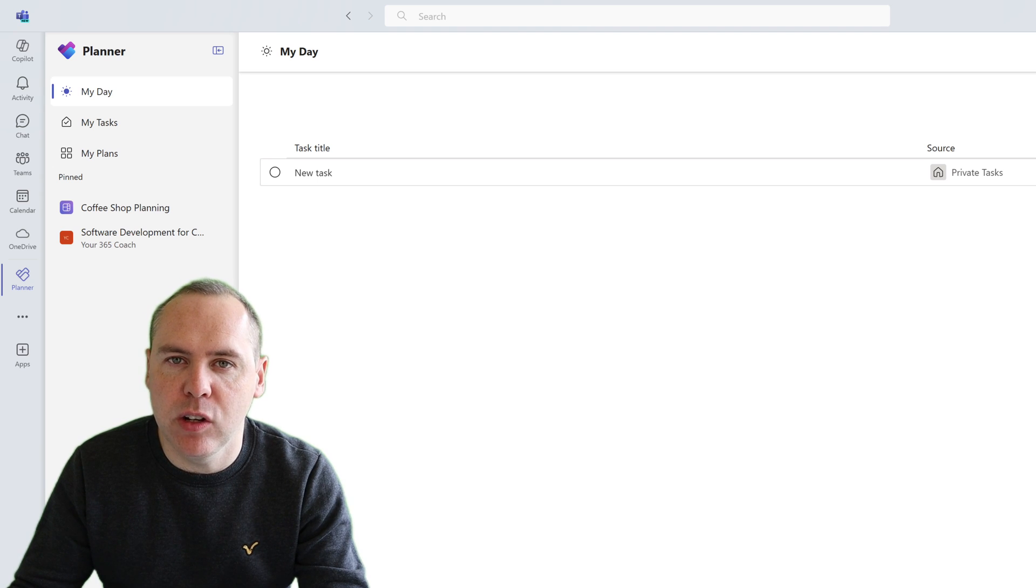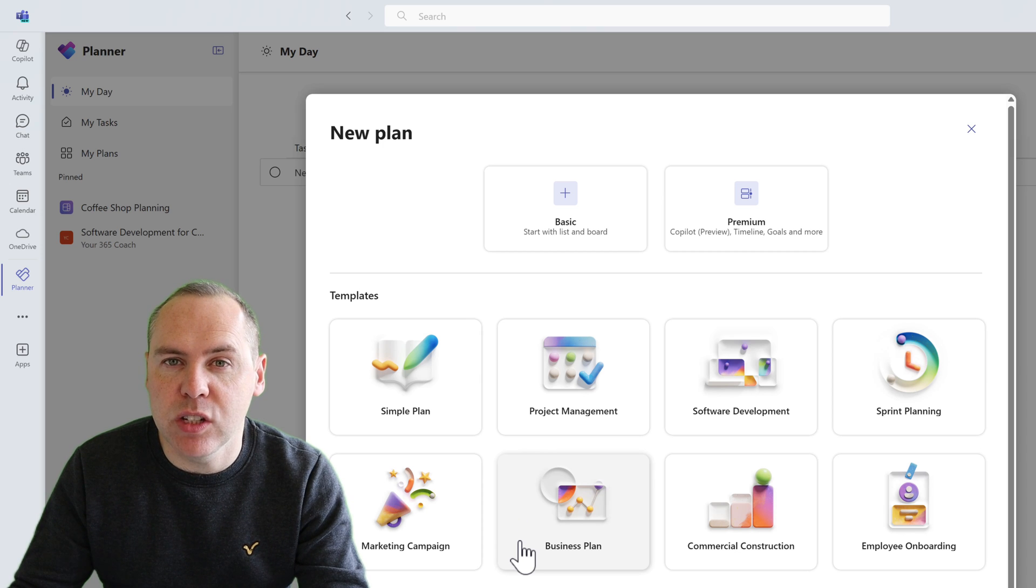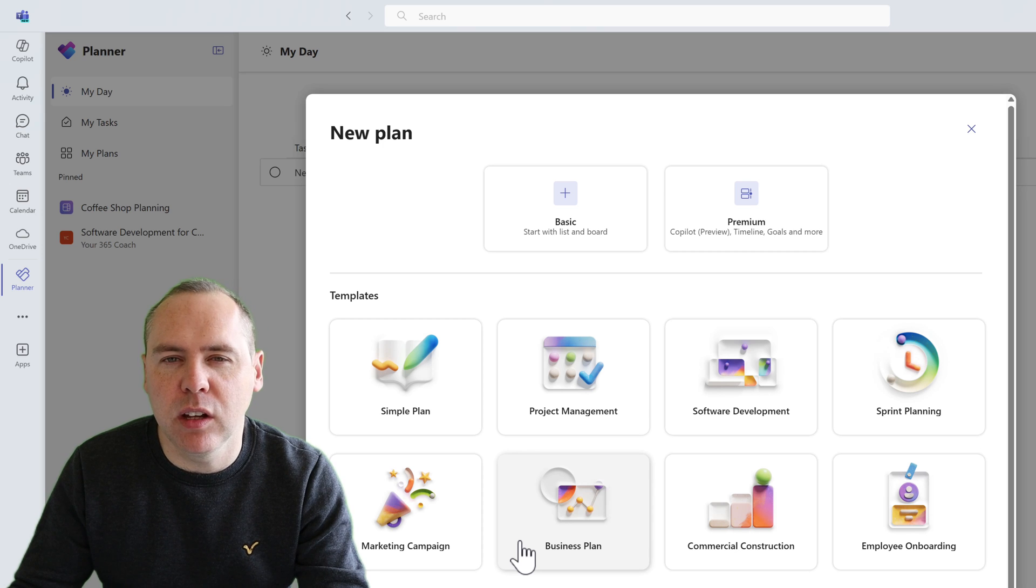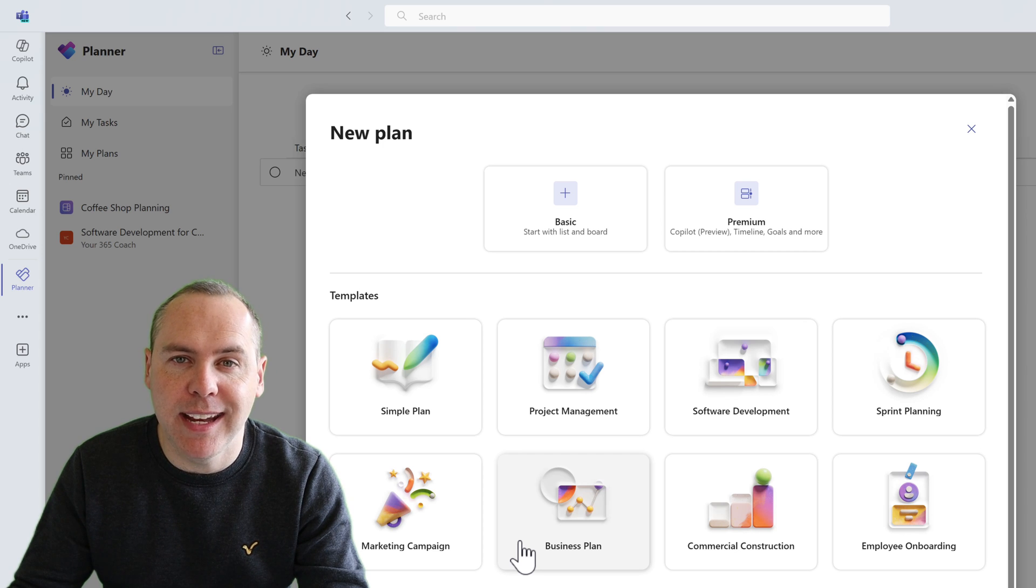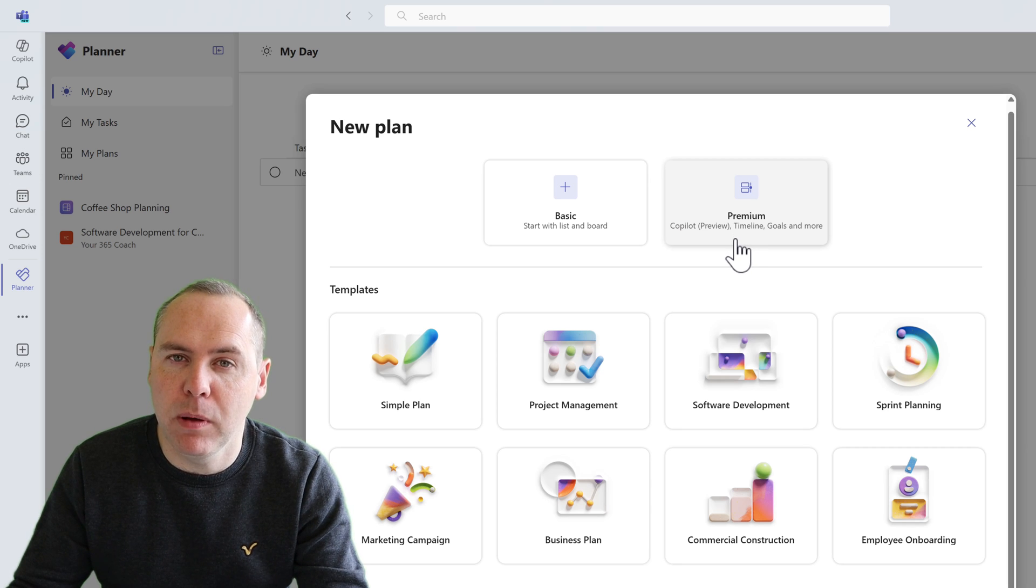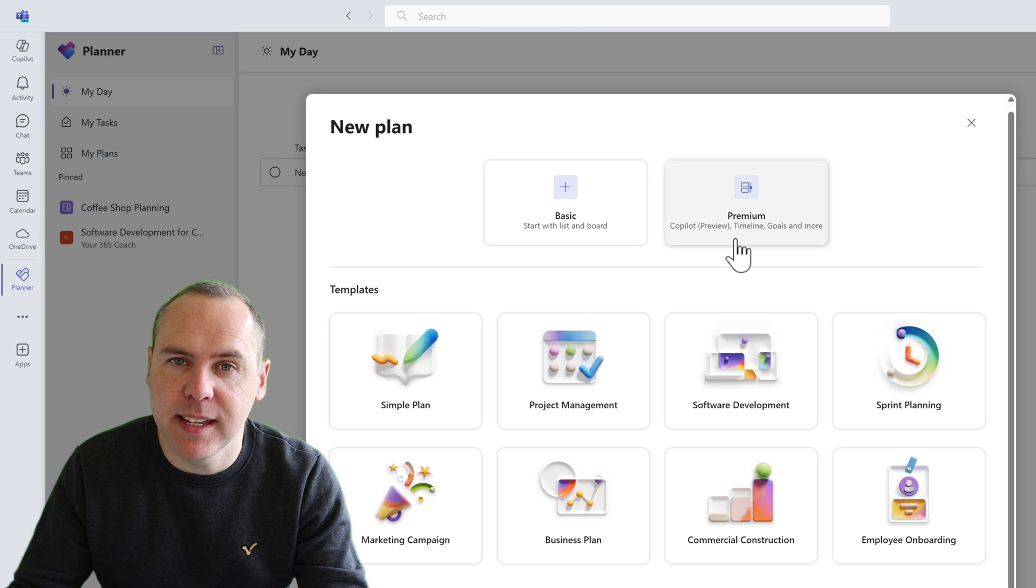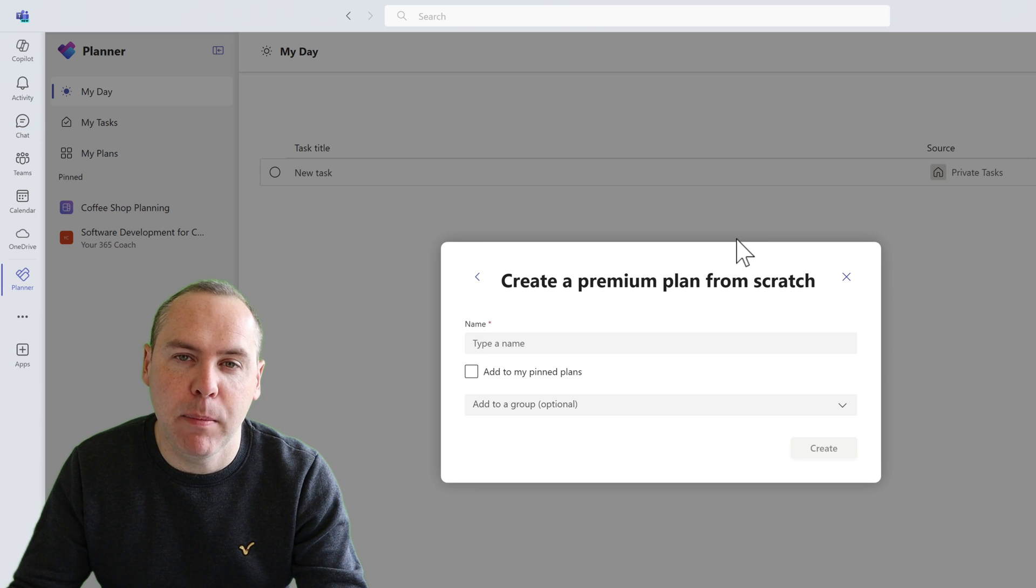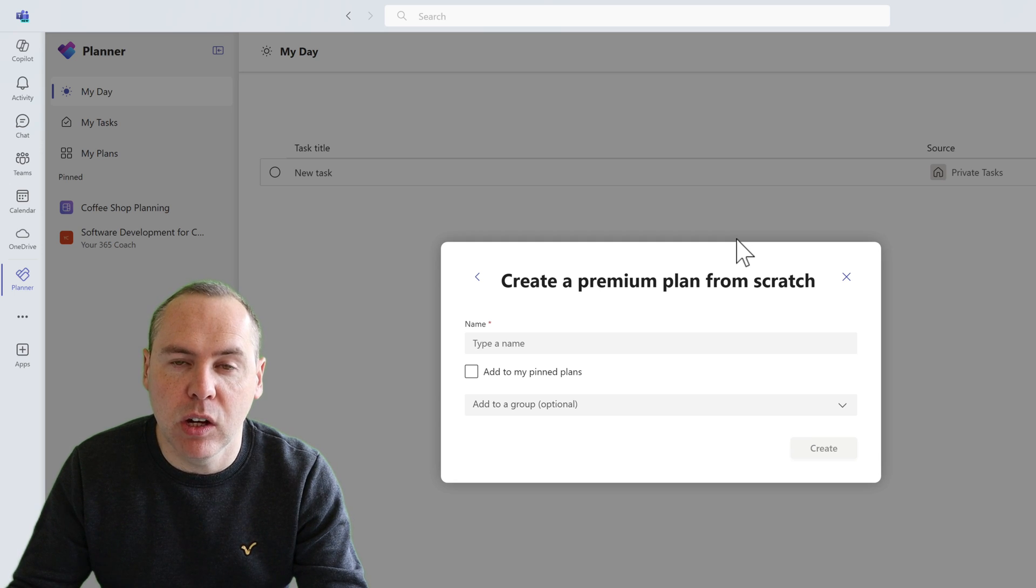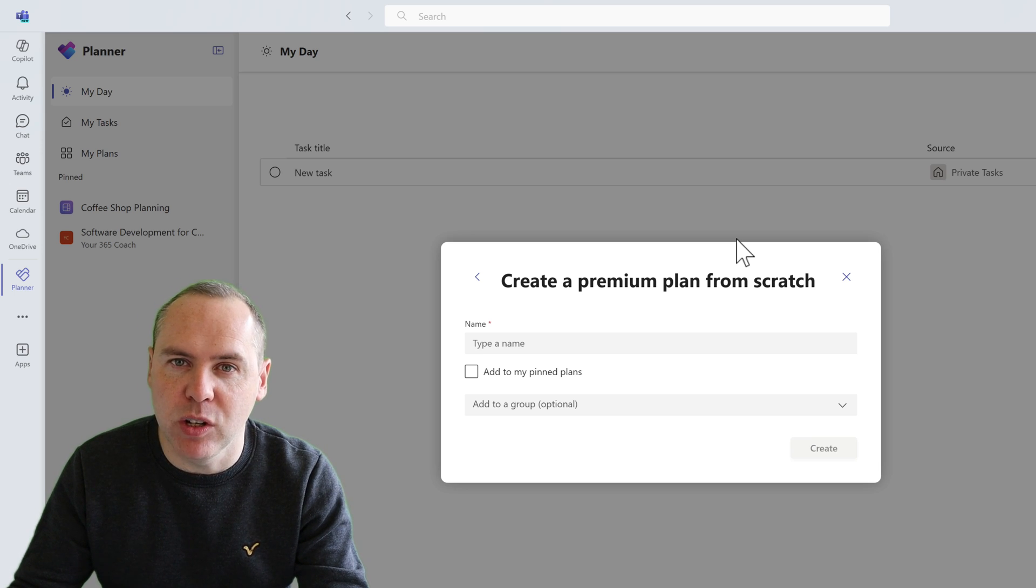We can go down and select new plan from the bottom left of the Planner app in Teams and we now have access to a range of templates. But remembering that Copilot allows us to create plans not from templates, in this scenario we're not going to use any of these templates. Instead we can go over and select a new premium plan because yes, Copilot is only available through premium plans but is not available in the basic or free version of Microsoft Planner. So once we go ahead and select premium, we can now give our plan a name and optionally we can also attach it to a Microsoft Team or Group to share it with your colleagues, or optionally we can also leave it as a private or personal plan.